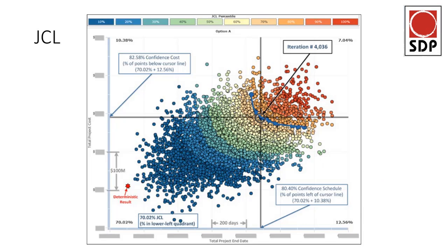My view has always been this: as you rightly point out, there's two schools of thought here. Use the entire thing as is after you've checked it through DCMA and all the rest. That's Colin Cropley out in Australia; he likes to use that. I think it's a waste of time, and there's no way in God's green earth that I can get a group of people sitting down and assigning probabilities, likelihoods and impact ranges to 5,000 or whatever items. I like to do a level 2, in some instances even a level 3 kind of schedule.